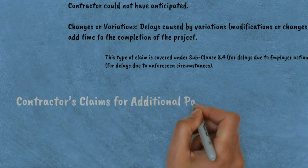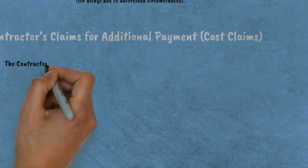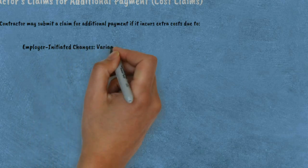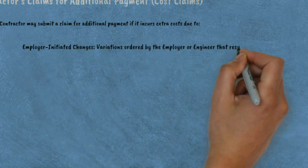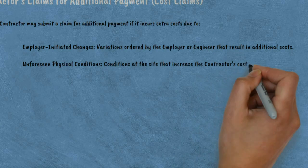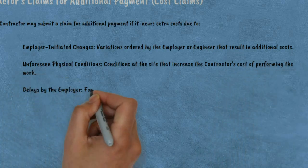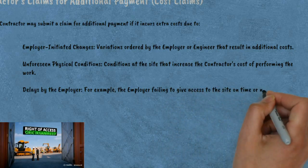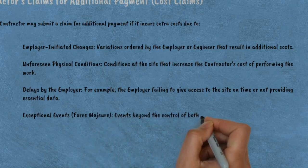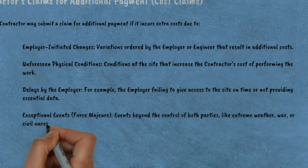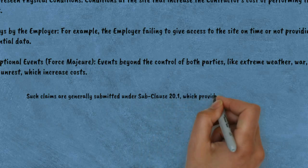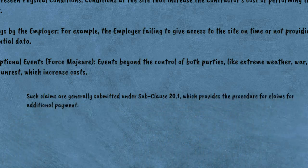Second, contractor's claims for additional payment — cost claims. The contractor may submit a claim for additional payment if it incurs extra costs due to: employer-initiated changes or variations ordered by the employer or engineer that result in additional costs; unforeseen physical conditions at the site that increase the contractor's cost of performing the work; delays by the employer, for example failing to give access to the site on time or not providing essential data; and exceptional events or force majeure — events beyond the control of both parties like extreme weather, war, or civil unrest which increase costs. Such claims are generally submitted under Sub-clause 20.1, which provides the procedure for claims for additional payment.